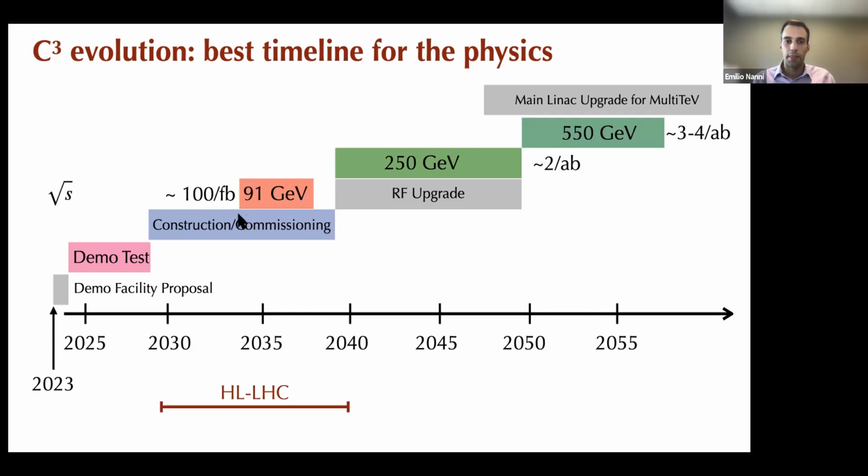The reason that this is possible is because you would build out the main LINAC, moving back from the final focus further away from the interaction point. And so the main LINAC that could produce 250 GeV center of mass would only be ready towards the end of this 10-year time period, and we'd reserve a year at the end for commissioning at 250 GeV center of mass. So right before 2040, we would be turning on at 250 GeV center of mass, and we would plan to operate there for a decade.